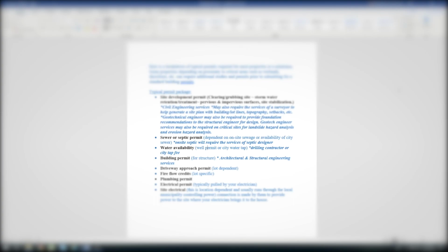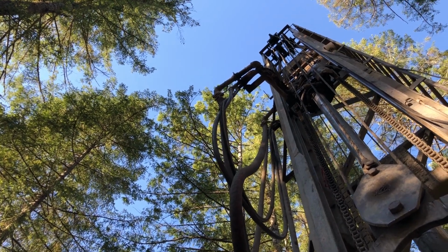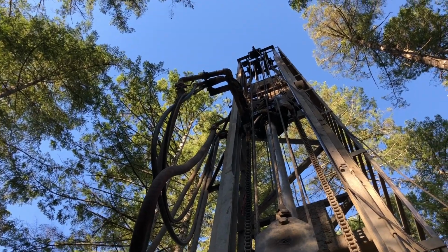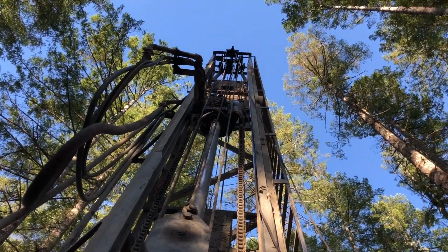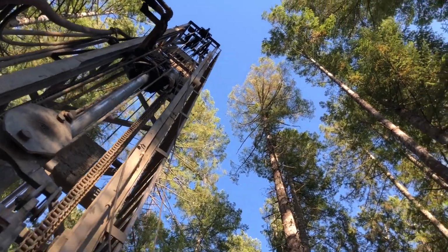We also had a setback to the water for the waterfront. The setback from the water was 50 feet for the septic. I think in this case it was based on the critical environment, the wetland and the shoreline. They wanted a 50-foot setback from that. So there's some good things there. In this one, septic was about $2,000.